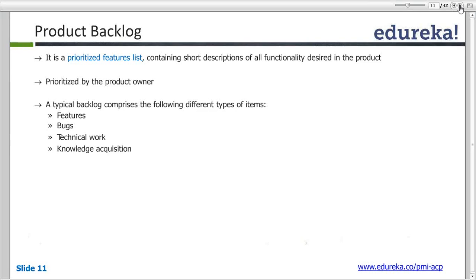For a typical example — going back to yesterday's example — if you realize that Josh is a common name and the username field level validation should change from two characters to more, this improvement request, ideally if you're working in Agile, would go back into your product backlog. The product owner would prioritize this in discussion with stakeholders, and if the priority is very high, it will be put as P1. Once your team is ready to pick new requirements, it would be picked up and worked upon.